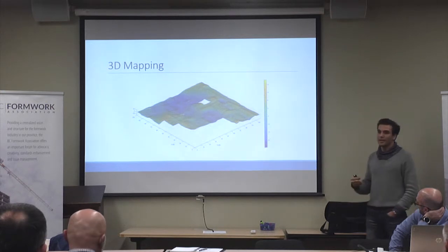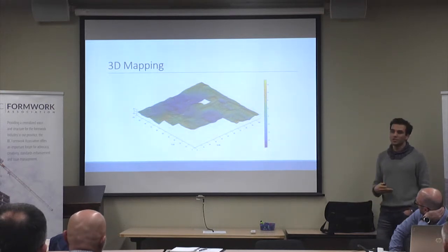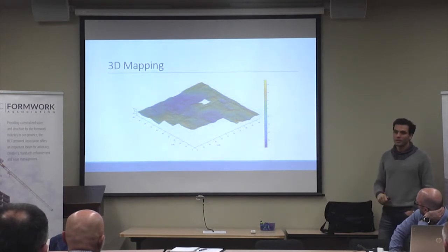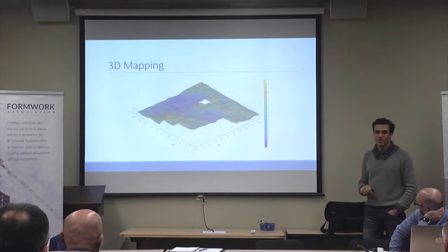And then we can calculate whether it's cheaper to grind or cheaper to fill it up with material, for example, from Arctics, which is usually the case. To fill it up is going to be cheaper because grinding is really time consuming.